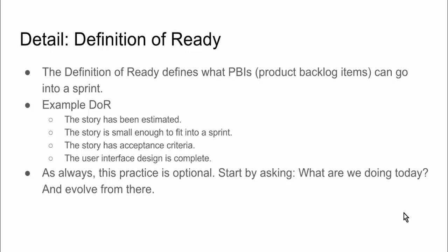So here's an example definition of ready. The story has been estimated. The story is small enough to fit into a sprint. The story has acceptance criteria. The user interface design is complete.